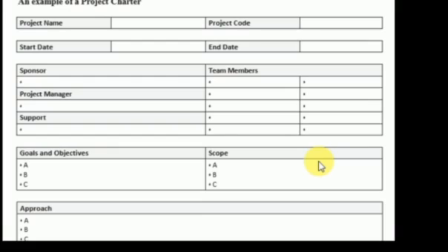Now one thing this team member does for you is that they help you to understand how much the project is going to entail. The person doing the construction, the building and raising of the blocks, will tell you how much it takes to buy cement, how much to pay their laborers, and how much to do everything. And the electrician will tell you how much it takes to buy the wire, how much it takes to wire the house. So by the time you put all their expenses together, you'll be able to tell how much is needed for that project.